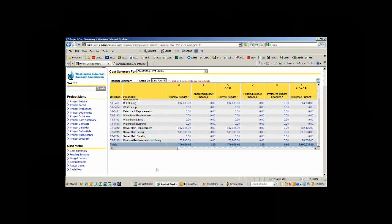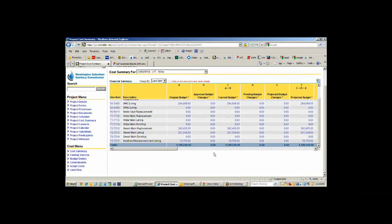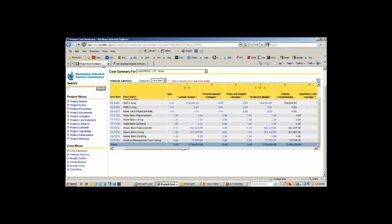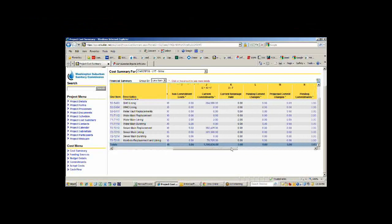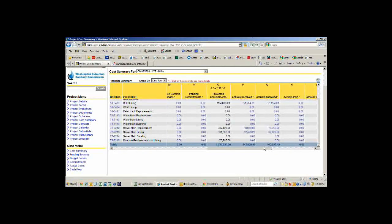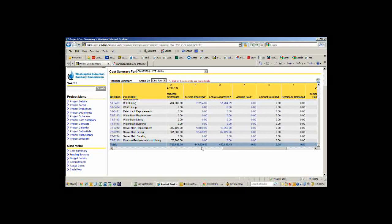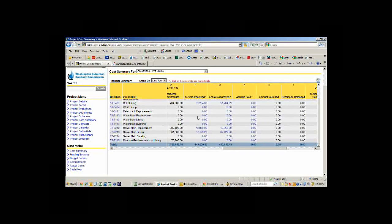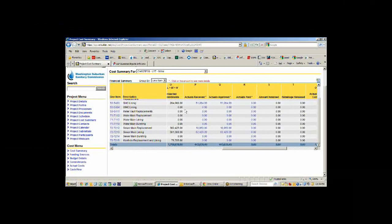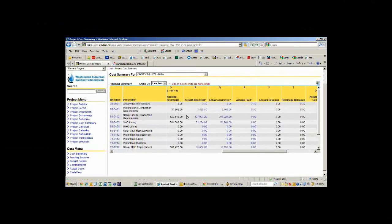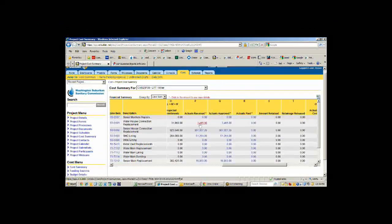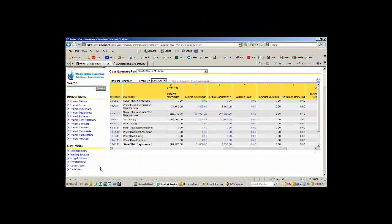If I want to now look at the cost, here's the cost for the projects, $1.7 million. If we scroll over here, we can see that our actual so far we spent $443,000 on sewer main lining, sewer replacement and sewer house lining and sewer house replacement and a little bit of water work.